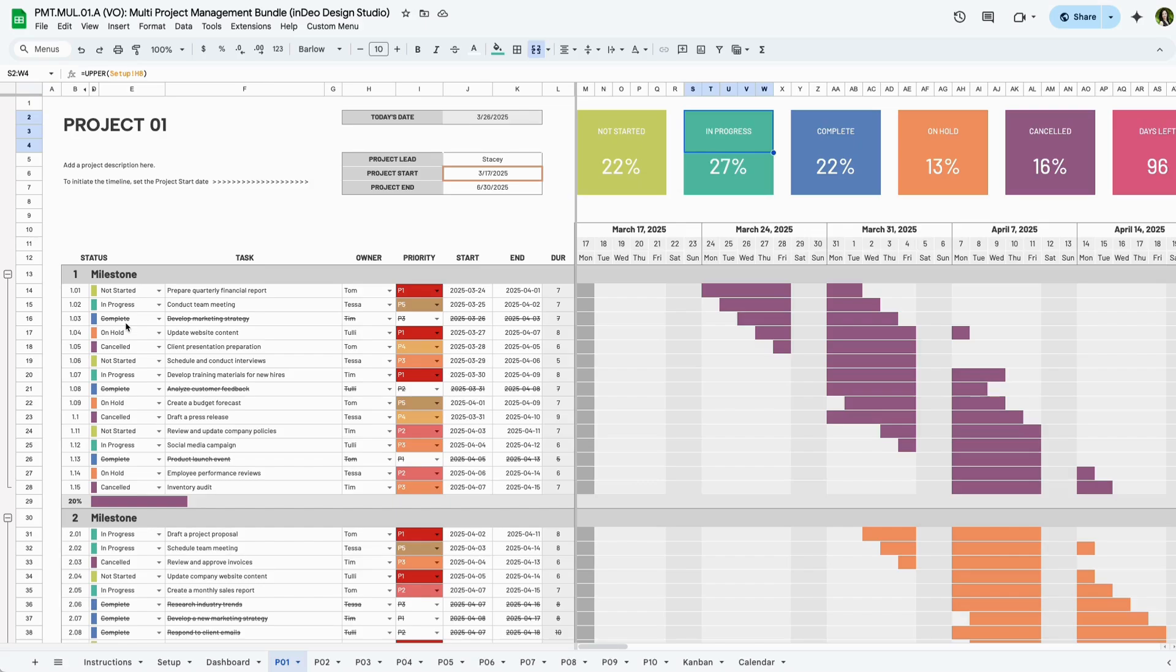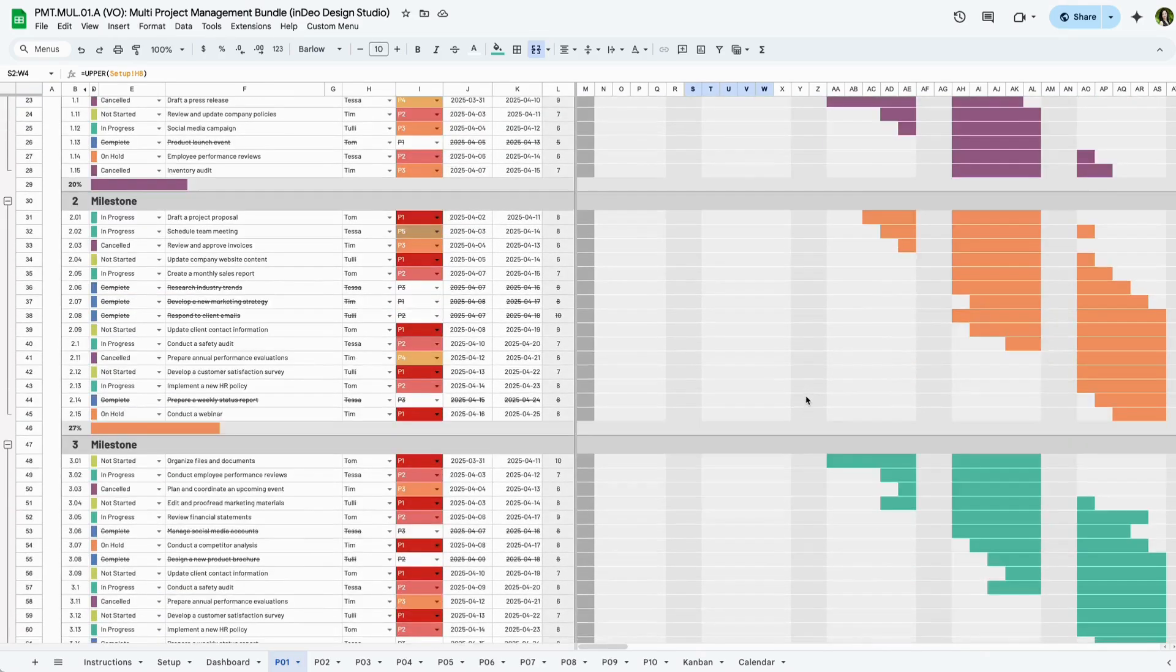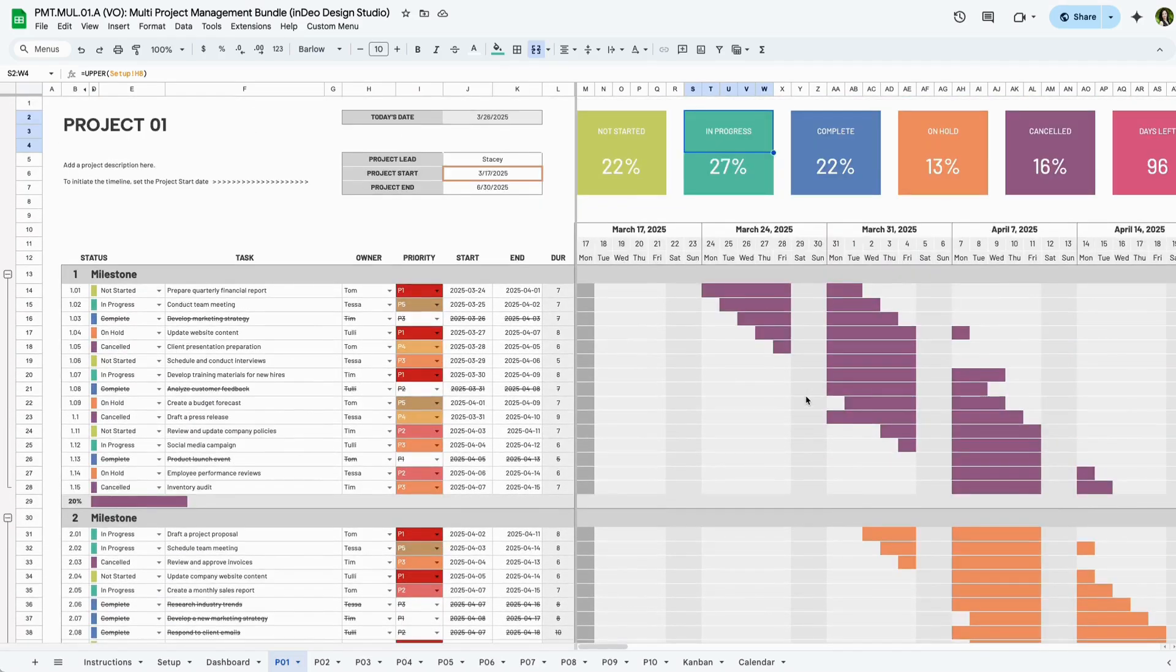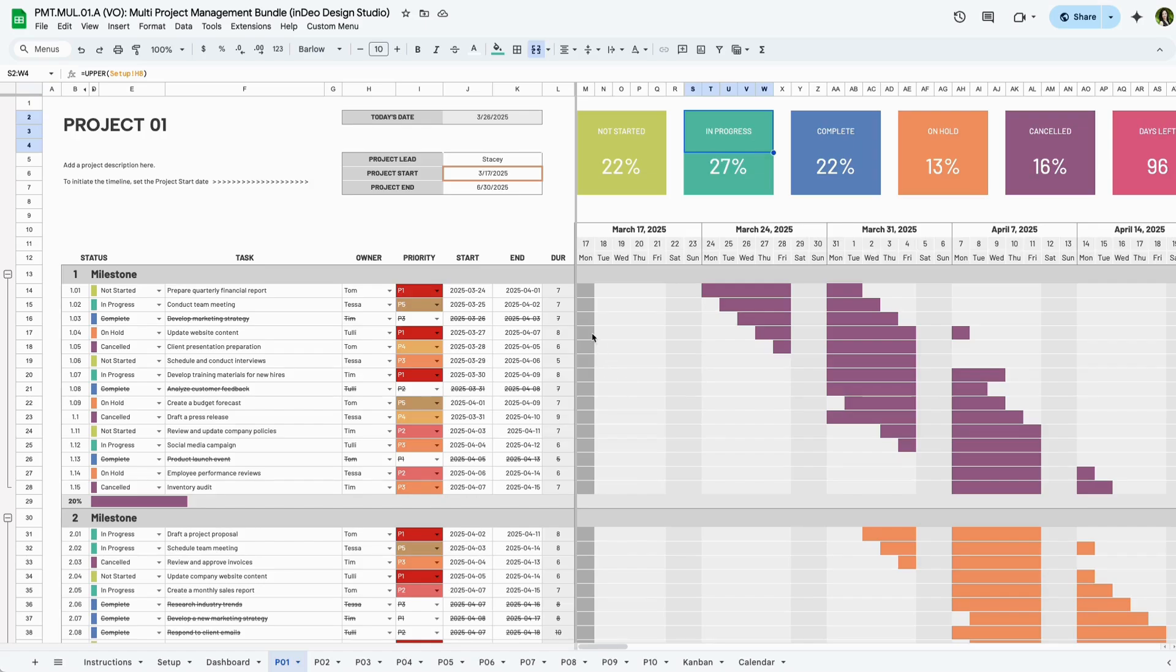As you enter task data, the Gantt chart builds itself and helps you to see overlaps, gaps, and progress across the milestones at a glance. The shaded columns indicate non-working days in light gray or holidays in dark gray. You can change these at any time in the settings tab. This tab transforms complexity into clarity so you and your team can stay focused, organized, and on time.